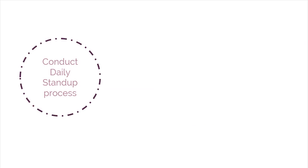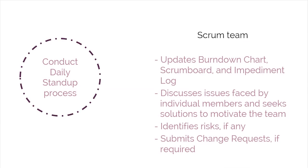During the Conduct Daily Stand-Up process, the team updates the Burndown Chart, Scrum Board, and Impediment Log, discusses issues faced by individual members and seeks solutions to motivate the team, identifies risks if any, and submits change requests if required.